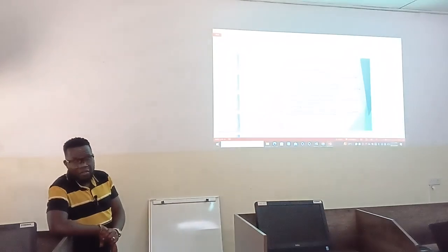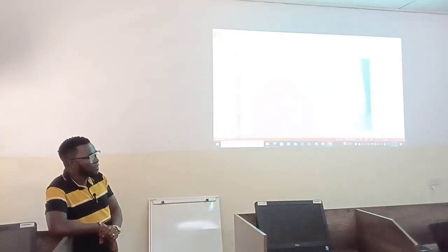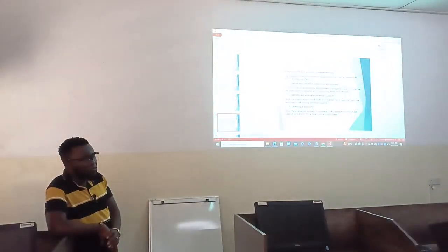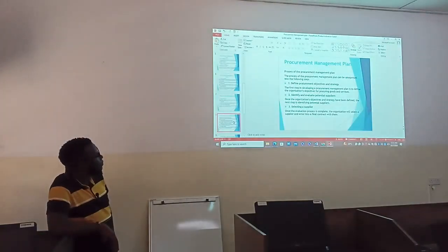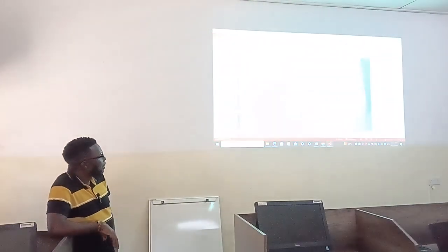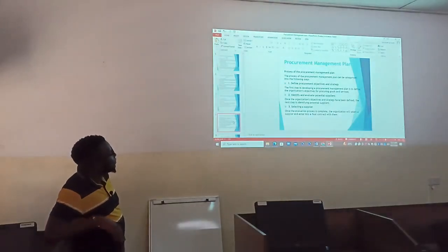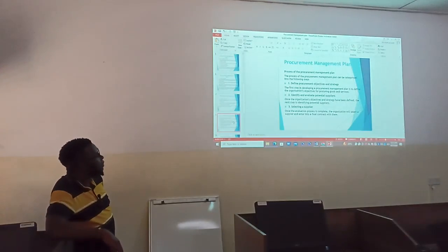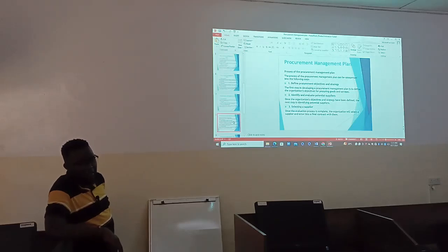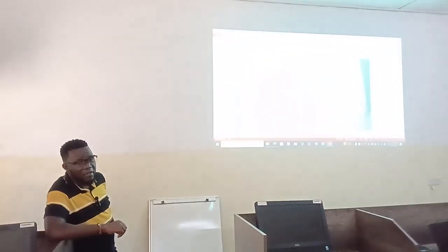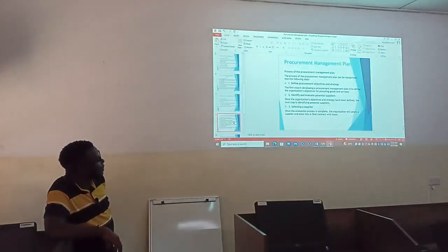You want to come up with the plan, and we say there are these components that are supposed to be there. We have seen quite a number of them. Now, let us try to draw that plan. So you first define procurement objectives. That's probably the first step. When you're trying to develop a procurement management plan, you are sitting here and you want to come up with that plan, then you define your objectives.